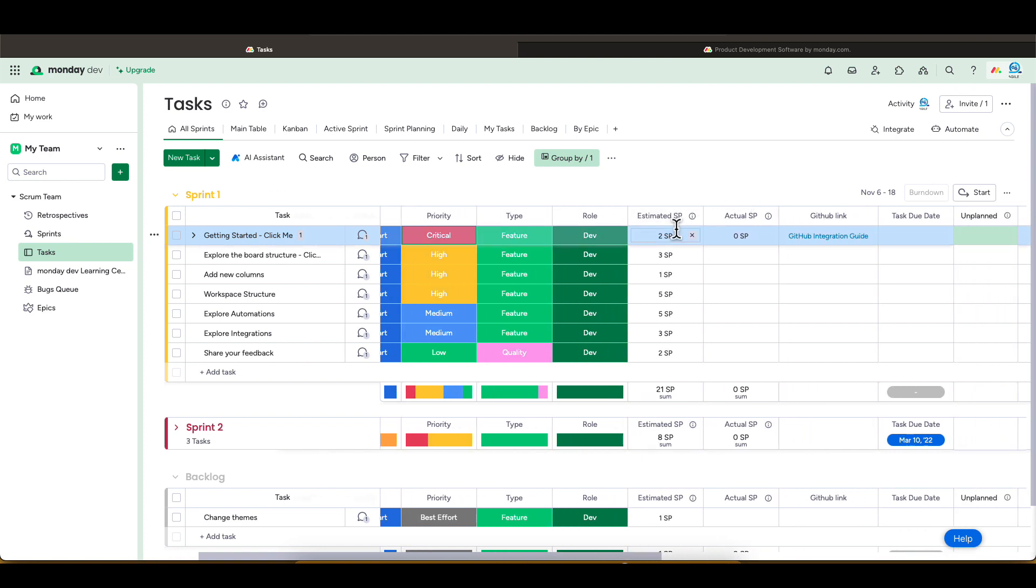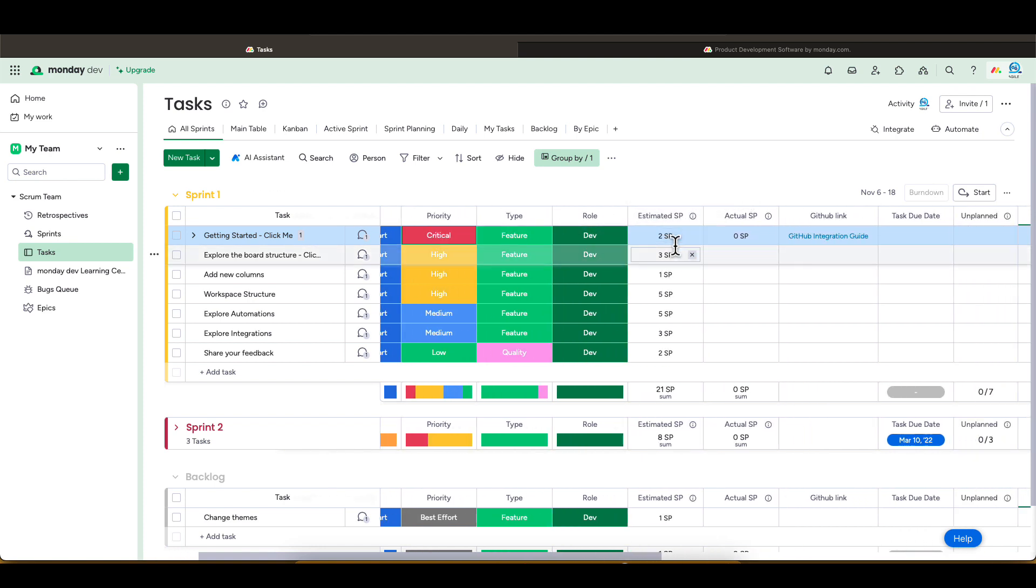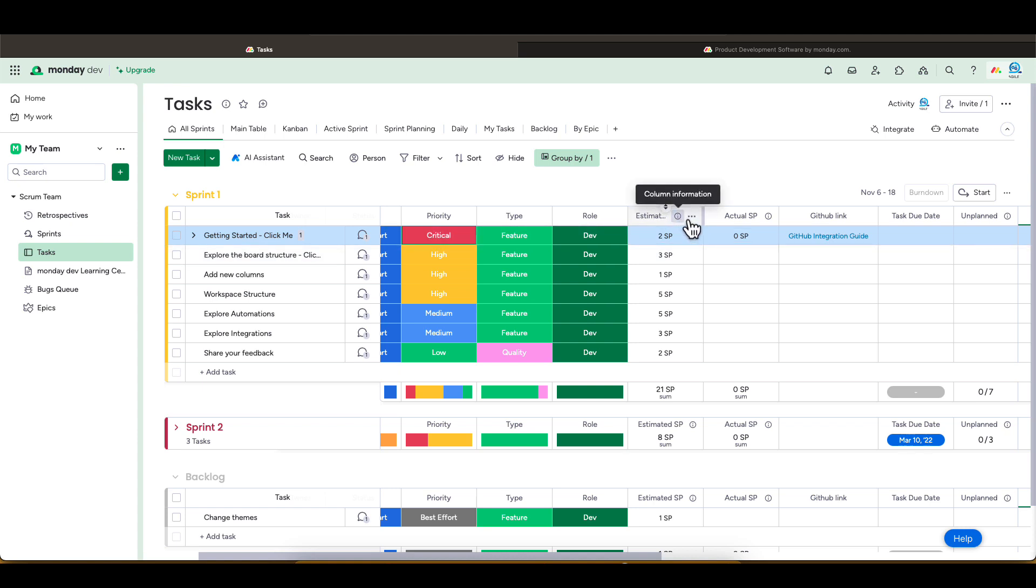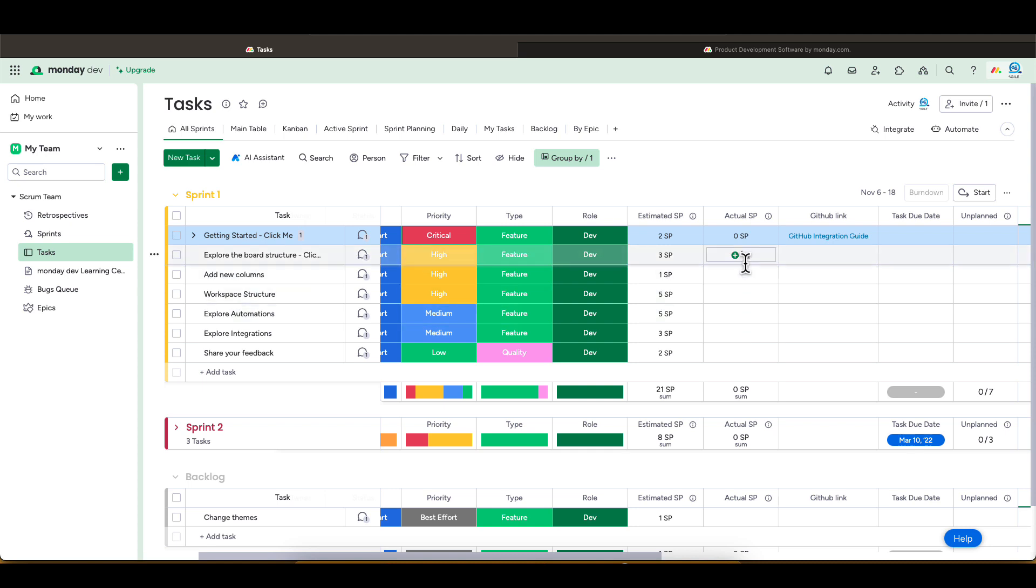We have two columns for estimation. This estimation is in story points. One for estimation, which is used before the sprint starts, and one for actual story points, which gets filled out after the user story was complete.